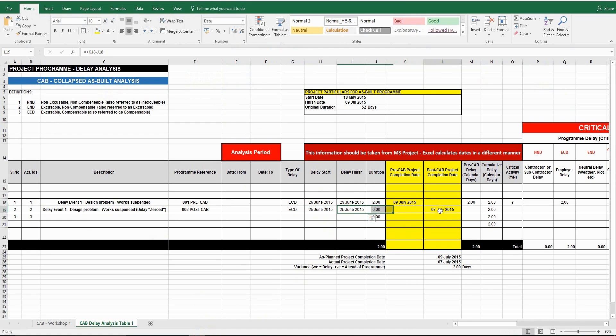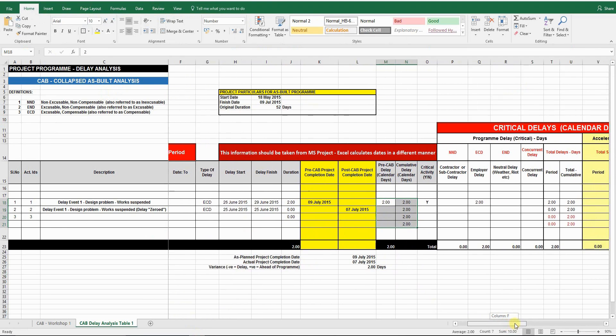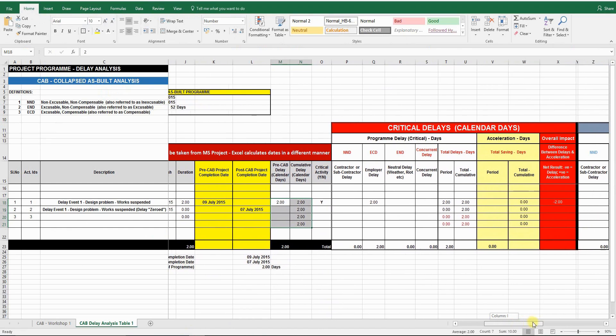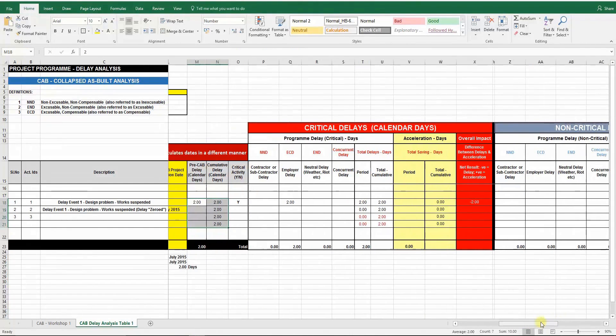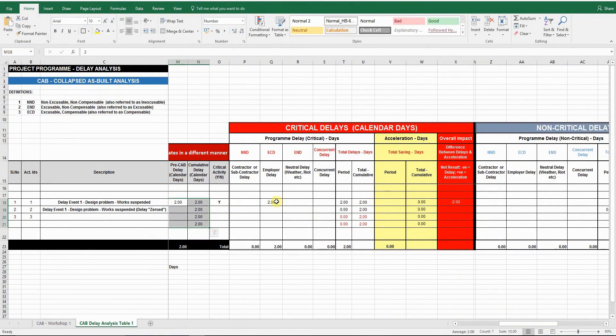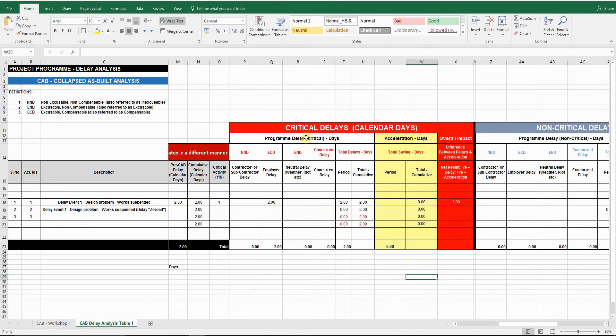So to conclude, there is a two-day critical delay caused by the employer, which is an ECD or a compensable delay. And this is how the collapsed as-built analysis is done.